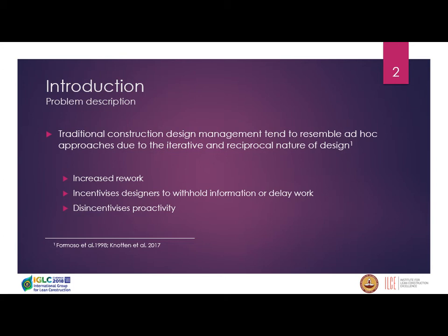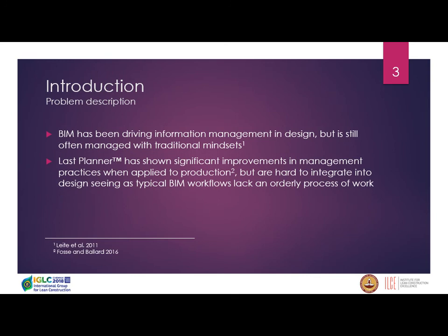What this does to the design process is that it often incentivizes the designers to delay their work, because the longer they wait before they start working, the more likely they are to pull relevant information from the other designers in terms of relevancy to the final construction. And these management styles effectively disincentivize proactivity among designers, which is vitally important because successful design is so reliant on having the designers working with each other and exchanging information between each other.